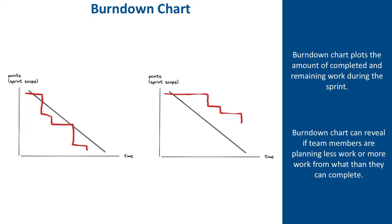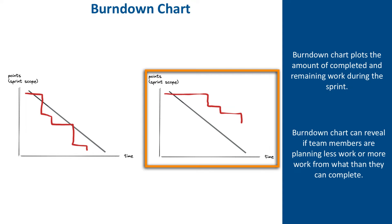There is also a reverse situation. If we notice that the team is often late in completing tasks by not finishing them within the duration of the sprint, that usually means that the team is too aggressive when they plan and they take more work than they can do in one sprint. This is also a warning sign of a problem that can have a significant negative impact on your project.